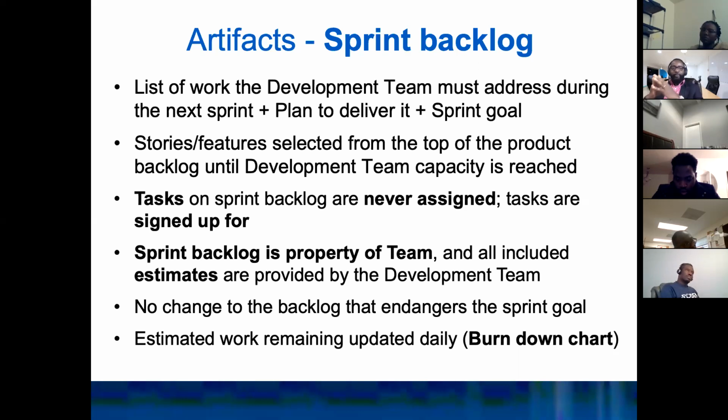Every day we look at how much work was already done. So if we had 80 points, that's actually how you design the burndown chart. It's a helpful chart that allows you to know how much work you've already done, and what is left in terms of story points. Initially, at the beginning of the sprint, let's say the team picked up a number of stories adding up to 80 points to their capacity, right? In the first few days, they're going to be completing maybe 2 stories of 5 points, right? That means that they burned